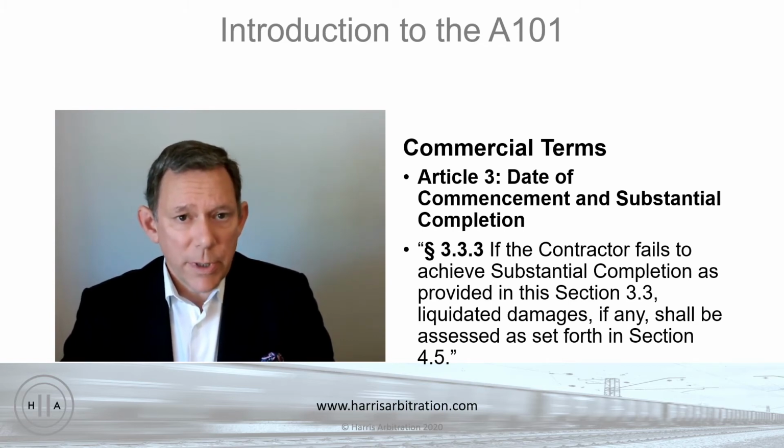So under the traditional common law rule, if a contractor were to agree to build a $50 million skyscraper for the owner, the contractor would have to perform 100%, including every last doorknob and light fixture, etc., in that skyscraper before the owner was obligated to pay anything. And if the contractor didn't substantially complete, then the owner was still entitled to the building. And so that seemed unfair.